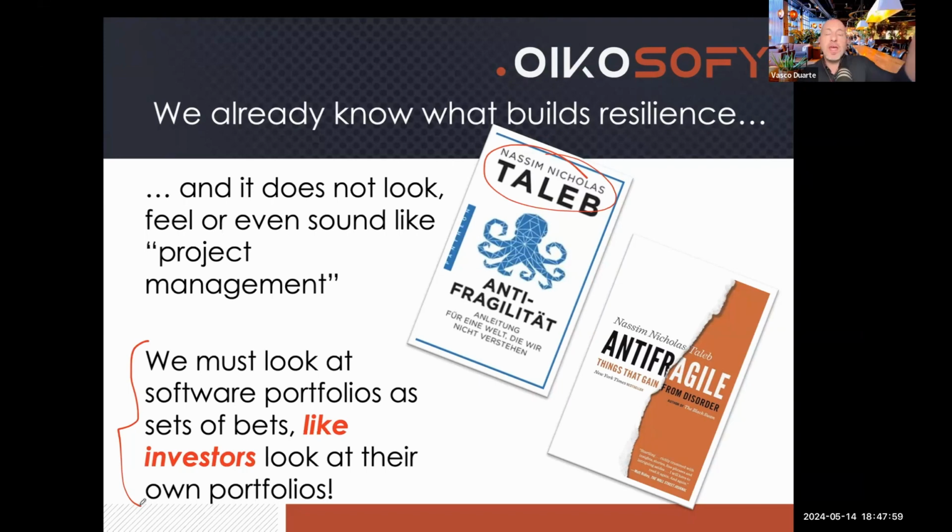Crazy ideas on one extreme, crazy ideas on the other extreme, simulate those, understand what the impacts are, because it is the outliers that have the biggest impact. And we know this intuitively from project delivery. We know that there is that one story, or that one architectural change, that drives most of the delays in a project when a project is late. And we also know, and we have data for that, that there is that one feature, or that small number of features, that drives most of the value for the products that we deliver. So this is the barbell strategy that Taleb talks about.